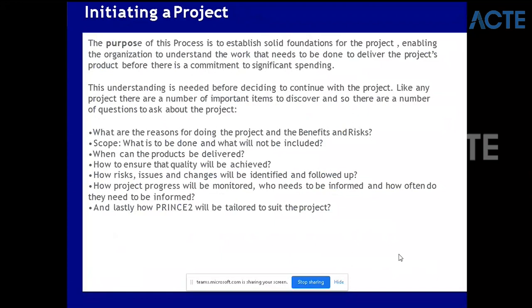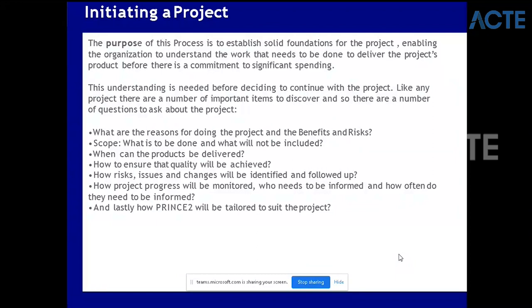This understanding is needed before deciding to continue with the project. There are a number of important questions to ask: What are the reasons for doing the project, the benefits, and the risks? What is the scope - what is to be done and what will not be included? When can products be delivered? How to ensure quality will be achieved? How will risks, issues, and changes be identified and followed up? How will project progress be monitored? Who needs to be informed and how often? And how will PRINCE2 be tailored to suit the project?